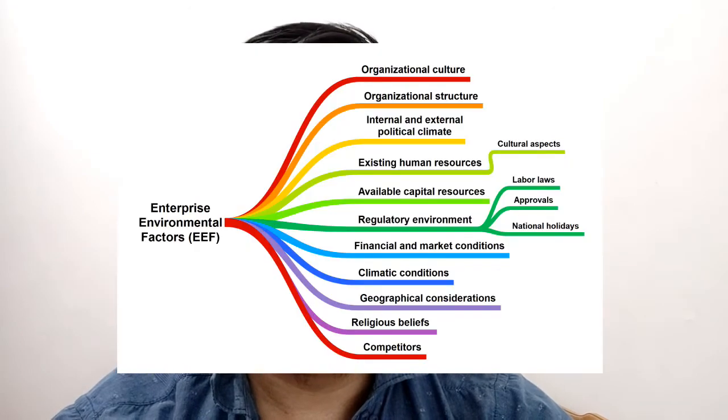And there's also enterprise environmental factors. The enterprise environmental factors that can influence the estimate activity resources process usually are resource location, resource availability, team resource skills, organizational culture, published estimating data, and marketplace conditions. But there are also others than that, such as this.